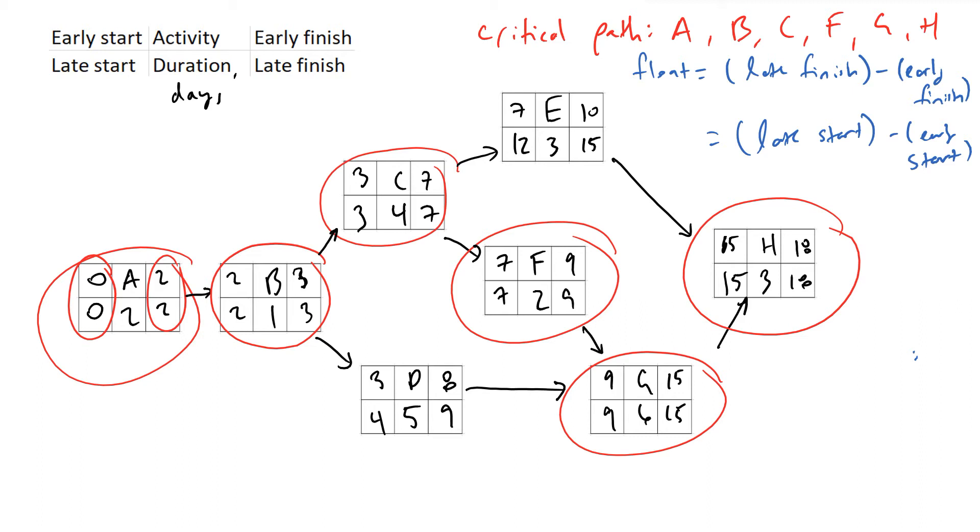And so in these cases, what we're going to do—if we take activity E—a question that you would get asked on an exam is: what is the float for E? Well, in our case, we would do the following. We would subtract the early finish from the late finish, and therefore float would be equal to... sorry, I'm getting ahead of myself... 15 minus 10, which is equal to 5 days.